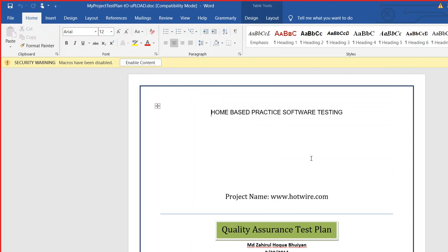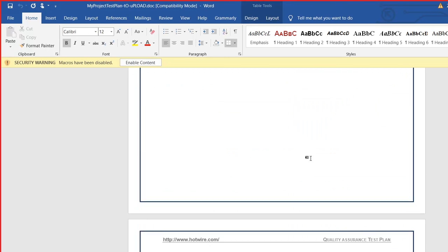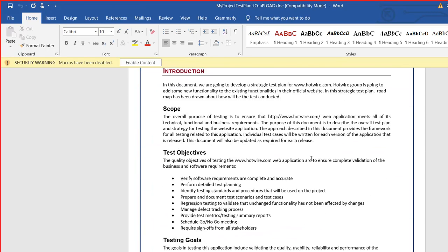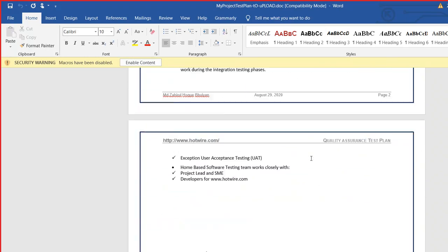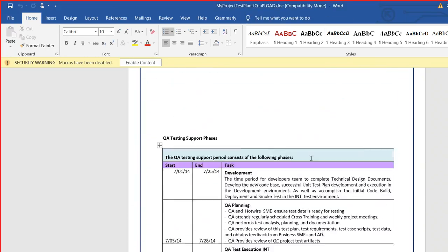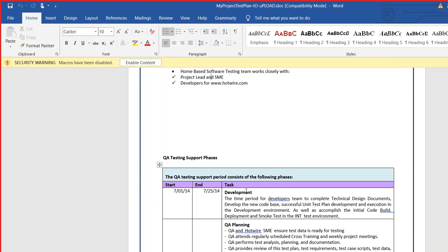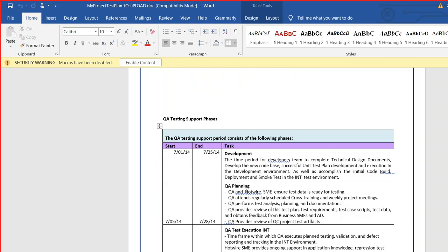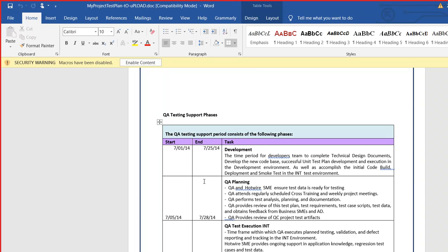They will be developing the code of the software, and in this second time schedule, can you see QA people analyze the requirement, prepare their test plan, write their test cases, provide walkthrough of the test cases to different people, and then QA people execute the test cases and report defects, right? If there is any defect, the development people fix the defect, and QA people retest.